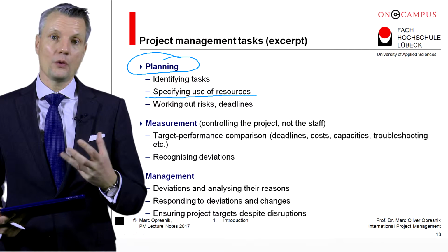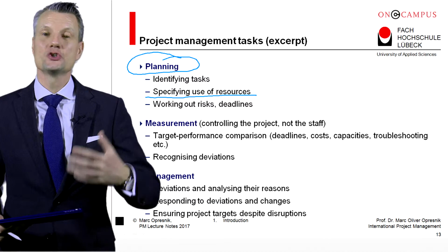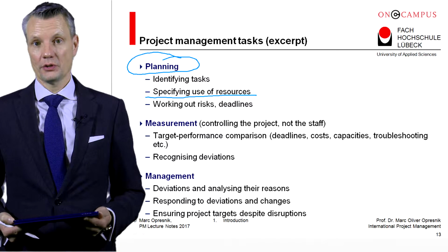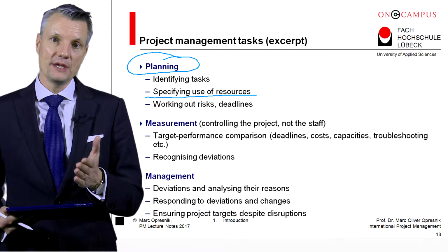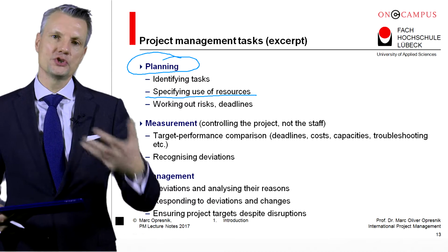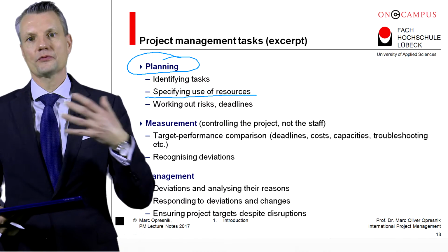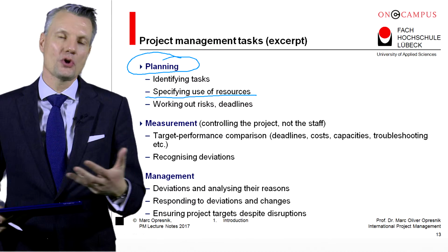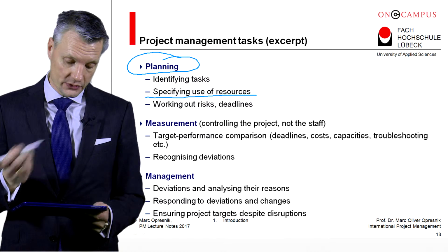You have to think whether you're getting the resources, so the people who work for the project, internally, or whether you source them from an external basis. In some cases it may be helpful and instrumental to get, for example, lawyers or engineers to write a certain kind of report from external sources rather than to use internal staff, because it can be less costly.